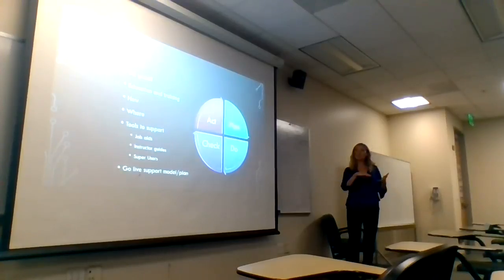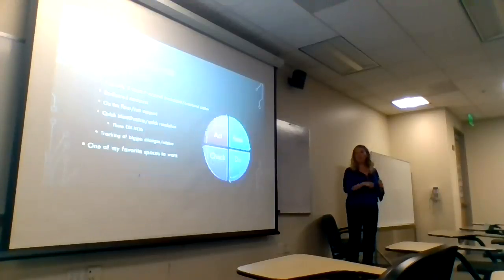But making sure you decide early what type of training is considered. What have other places done? Where does this training need to occur? Can it be done as an online learning module? Does it need to be done in person? Can it be kind of a blended approach? Job aids, instructor guides, super users, and then having a go live support model and plan.